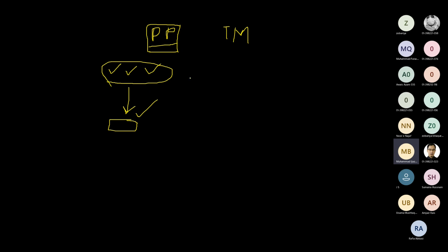Once that planning is over, the next phase of planning starts, and that is the detailed planning, the upfront planning, in which before going into execution, we prepare a detailed plan. That detailed plan is generally termed the project management plan, which has various subsidiary plans in it, maybe 12 plans, and 3 or 4 baselines, like 3 baselines combined together. The fourth baseline is the performance management baseline, and 2 other things. And what are those 2 other things? These are planned first.